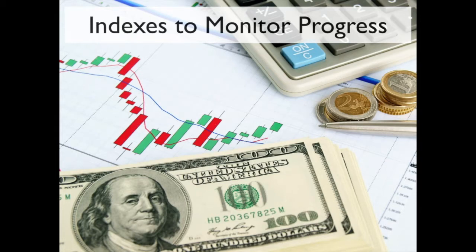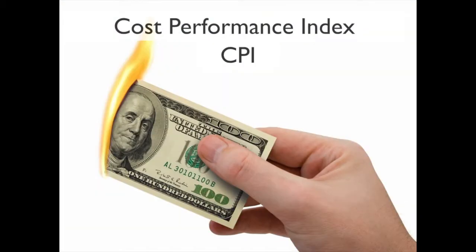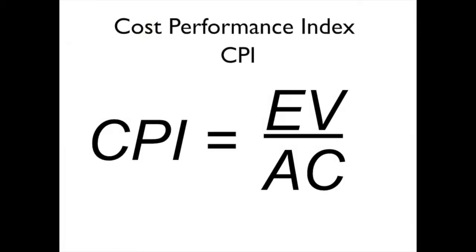We're going to look at the first of several indices that we can use to monitor our project progress. The first one is CPI, or Cost Performance Index. It measures the cost efficiency of the work accomplished to date — basically, are we burning through the money at the rate that we thought we would? CPI is calculated by taking the earned value divided by the actual cost.